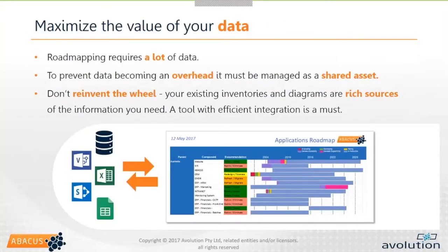The third preliminary consideration is really important when talking about road mapping — you're going to be working with a lot of data, whether applications, processes, or technologies. You need to actually manage that data as a shared asset to prevent it becoming an overhead. I can speak from personal experience of road mapping initiatives where the data got out of control and actually derailed the whole initiative. If version control is out of step or people are working on different versions of the data, that can be a major problem, so you need to have some management around that information.